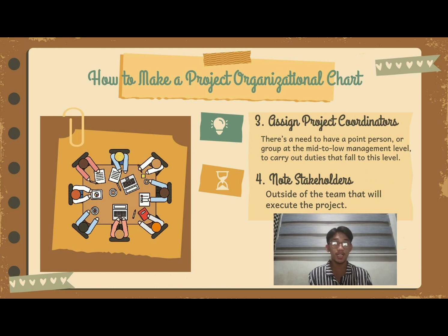Step number 3. Assign project coordinators. There's a need to have a point person or group at the mid-low management level to carry out duties that fall to this level. This person or group will help synchronize team tasks. The number of coordinators will be determined by the size of the project, but always focus on 3 areas of a project: planning, technical, and communications.